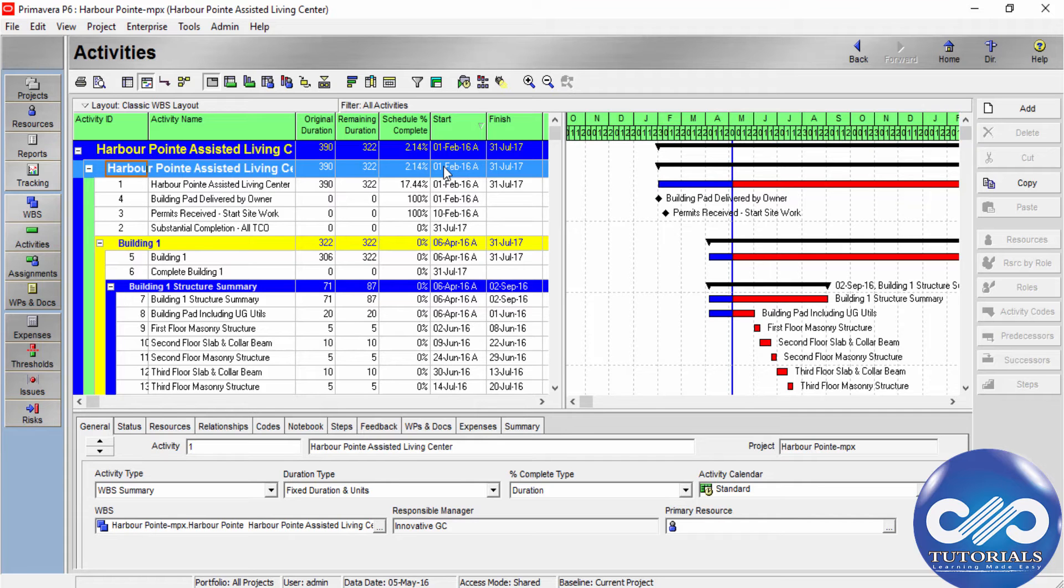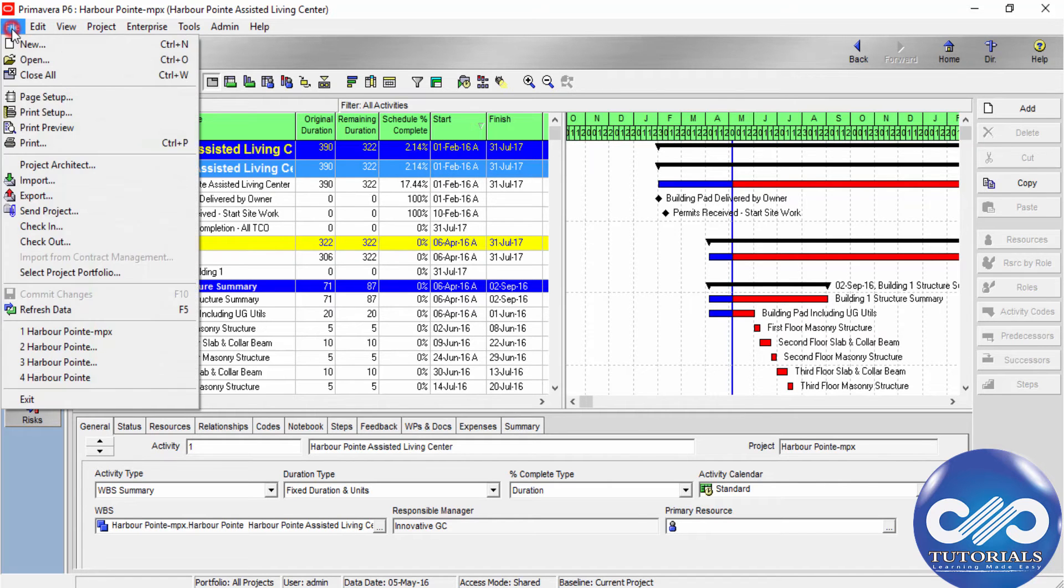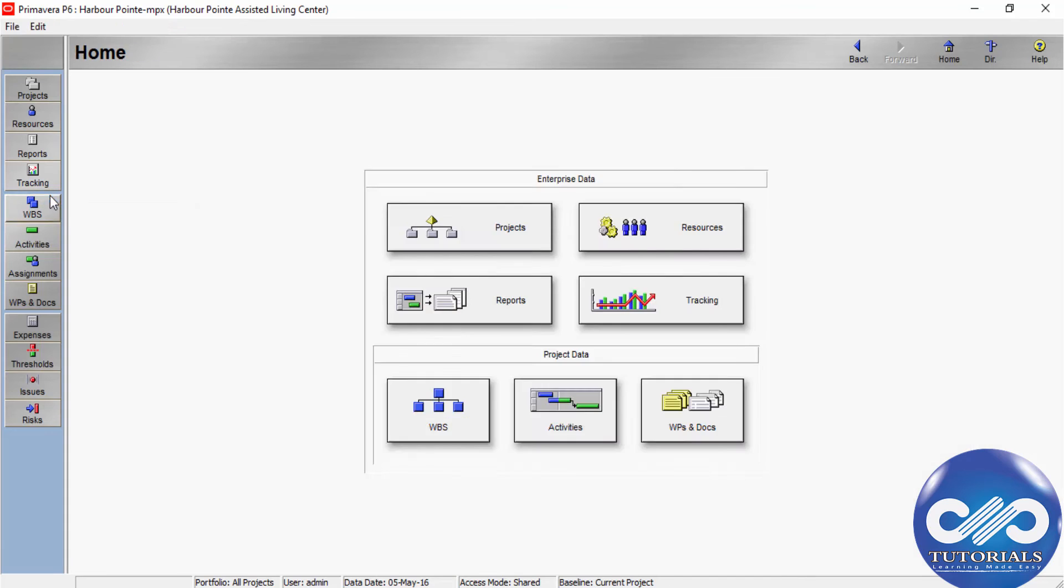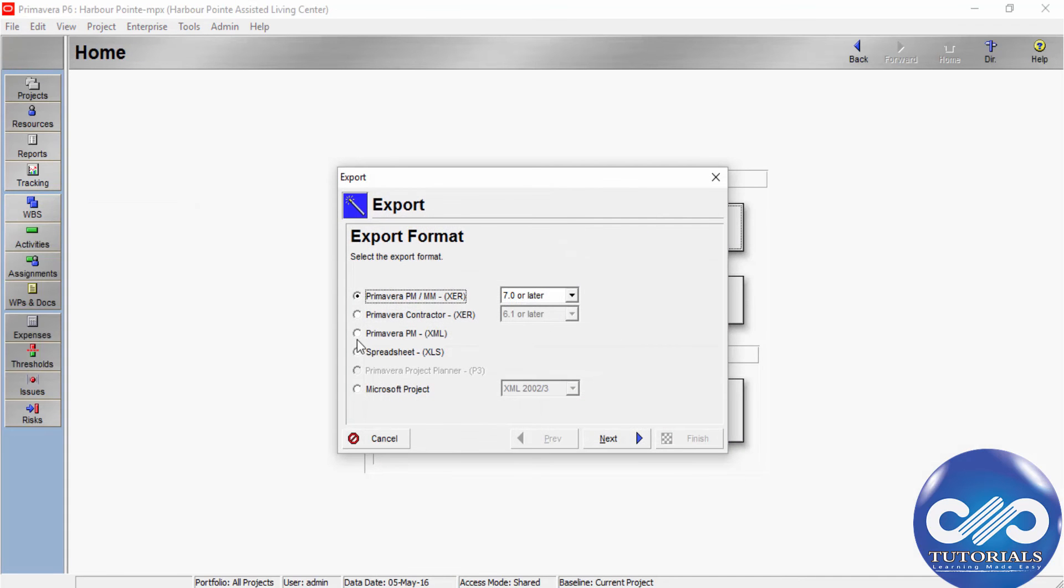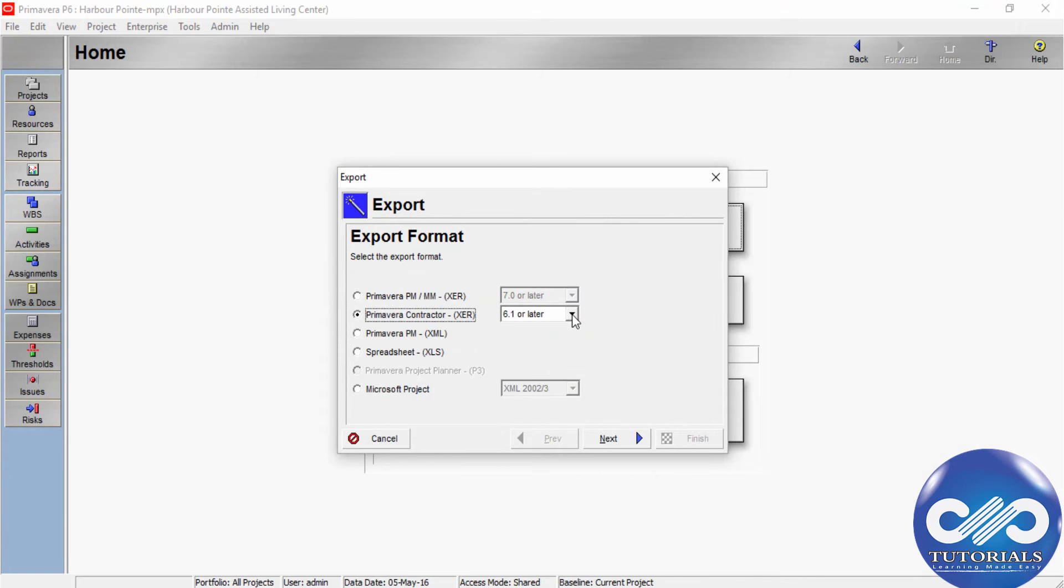into XDR files. First, open the project you want to export in the PM module. Go to the menu bar, choose File, click Export, choose Primavera Contractor XDR format, and you can select the